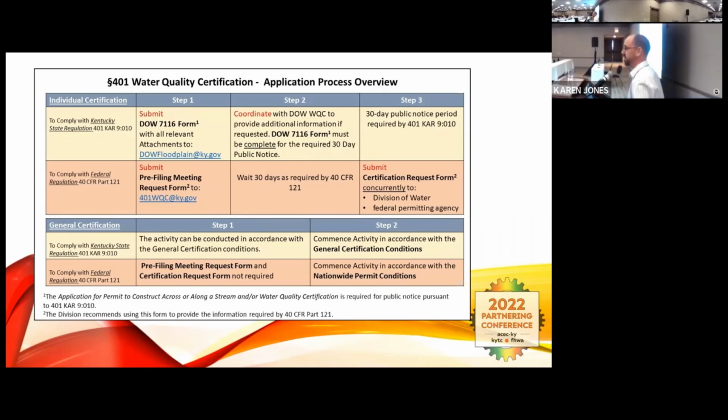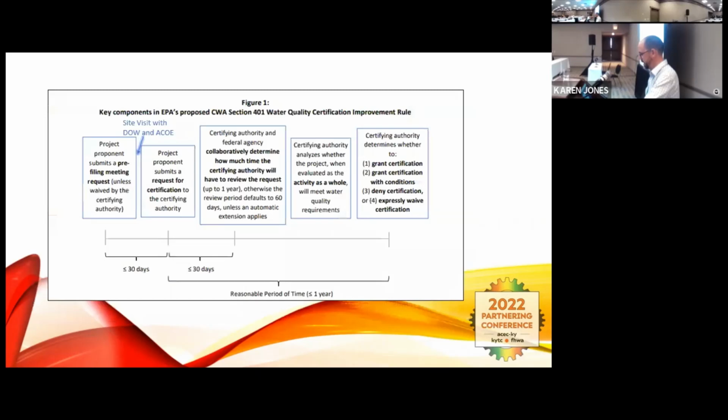I'll reach out to engineers like John Michael and others and say, I need a little more information here to get this permit. They're asking how we're going to access this temporary staging area. Things of that nature. That's where that gets flushed out. That can take months if we don't have all the information up front, and it's kind of a sensitive project where they're asking more questions. I wish that was more standardized, but it's not.